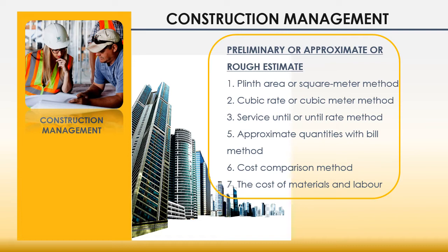If you are taking a single method, the square meter method is done by selecting the price of 1 square meter area of the building, and it is mainly for calculating the cost of office buildings, residential buildings, school buildings, apartments, hospitals, etc.